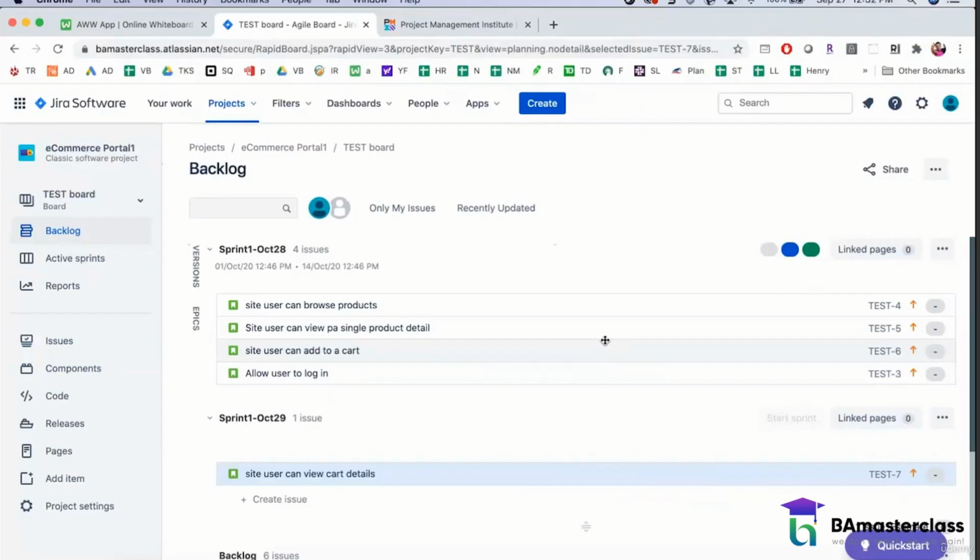I ask them to tell me the boundaries of each story, what will be done in every story. And then they literally babysit me, saying, first story is this, second story is this, third story is this. They describe the entire verbiage of the story because it involves technical work I'm not familiar with. Then I convert the previous story, which I thought was one story, into an epic, and I create child stories under it. Make sense? Makes sense. Okay.